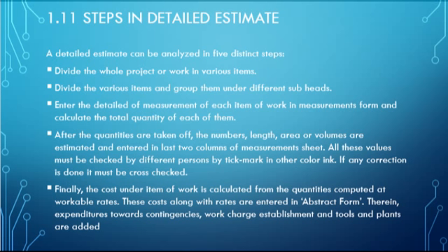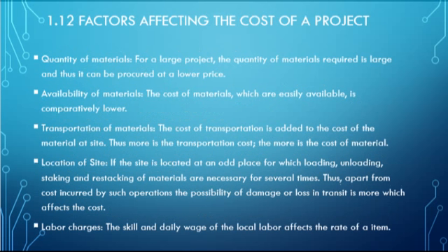Now, what factors affect the cost of the project? There may be, I think, five factors which are mainly affecting the cost of the project. Number one, quantity of the material. For a large project, the quantity of material required is large, and thus it can be procured at a lower price. As I earlier discussed to you, if you have to purchase a huge amount, your price may be lower. That is wholesale price.